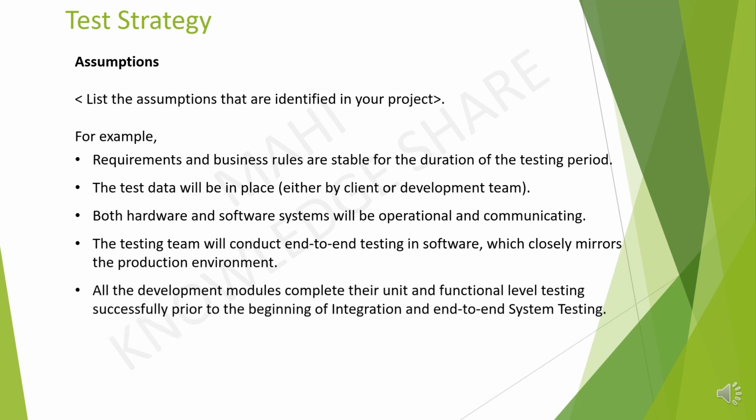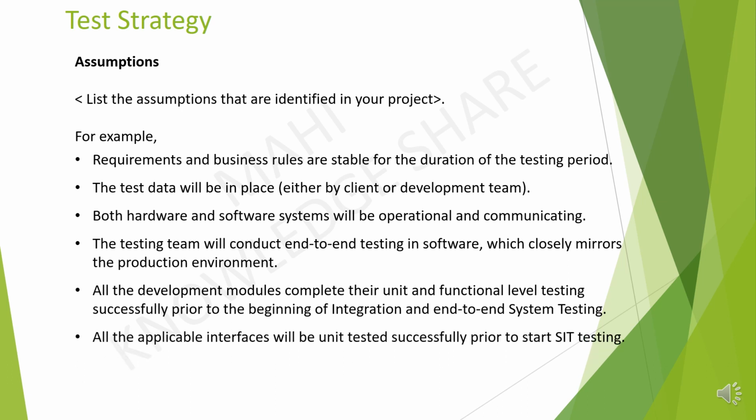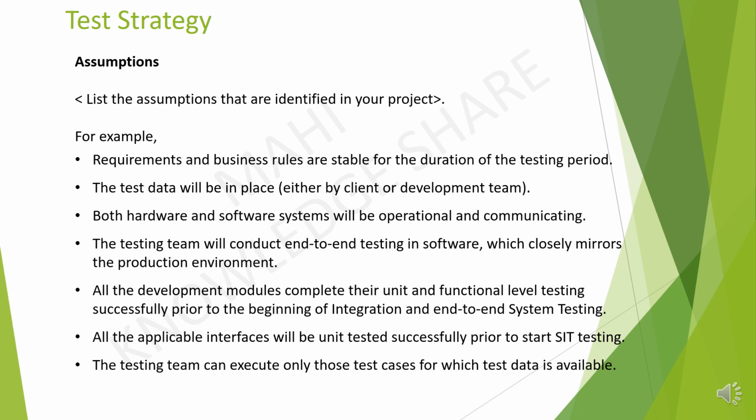All the development modules complete their unit and functional testing successfully prior to the beginning of integration and end-to-end system testing. All the applicable interfaces will be unit tested successfully prior to start system integration testing. The testing team can execute only those test cases for which test data is available.